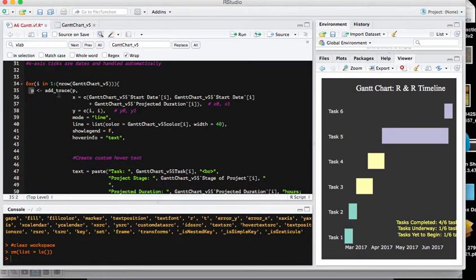Since we're going to push this into P, we're going to add a trace for P. From here, we're going to put in our Gantt chart where our array is, the start date is what's emphasized. So if you notice, just like we talked about previously, we're going to do start date and then start date plus the projected duration. So the start date is what our x-axis will be, kind of, and then the length of the line is the start date plus the duration, like I just noticed. And then the y is I because it's based on these tasks. Remember, each task is an I.